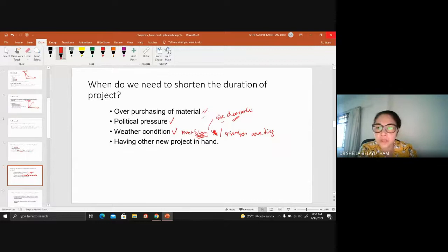So same goes to countries with four season. So usually countries with four season, they have this time frame where it is non-earthwork season and also earthwork season. So non-earthwork season are basically during the almost fall, winter kind of season, more or less winter. So prior to winter a bit. So non-earthwork season and earthwork season are basically during the summer. So and there are time frame for it, and of course when you're talking about four season, they have shorter daylight.